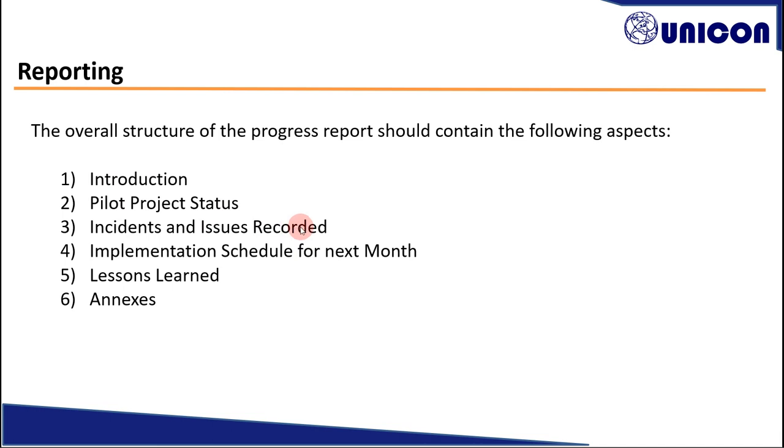incidents and issues recorded, records from field supervision protocols, implementation plan, work plan, and schedules for the next period, lessons learned, and other details as may be necessary, and make sure to attach annexes comprising photos, field records, and other information that needs to be presented to stakeholders.